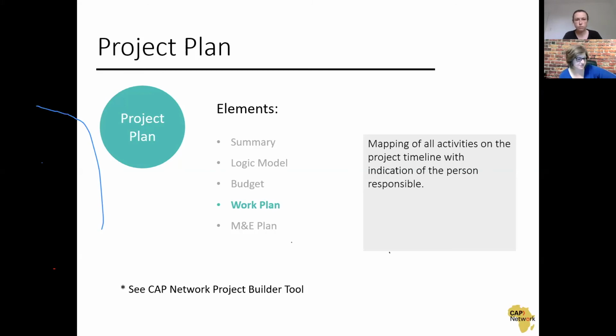Yeah, so those would be in the overhead line, indirect line, administration line, and each funder is going to have its own guidelines around how much of that they will fund. So you have to follow whatever that funder says, and it could be 5%, it could be 10%. In Canada, Global Affairs Canada is 12%.